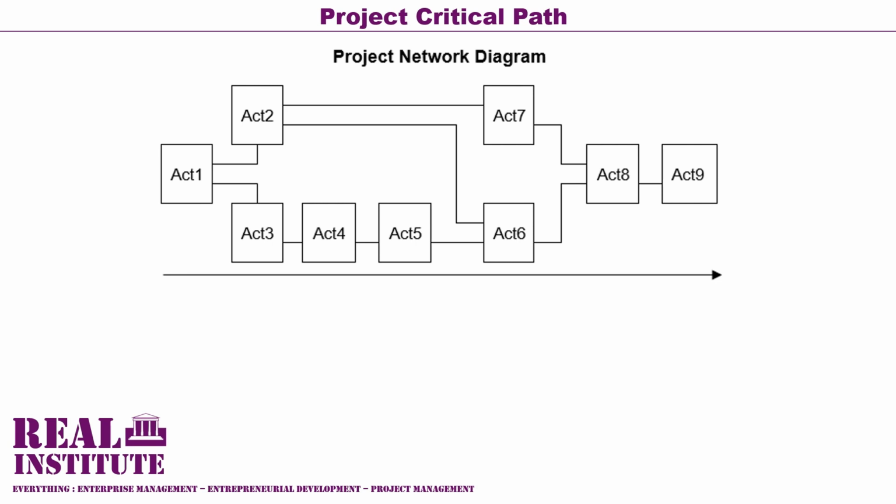Logically and practically, the house walls building activity cannot start and cannot even happen before the activity of building the house foundation has been completed. Such a relationship, such a logical and practical dependency between and among the project activities, is applicable to all types and all sizes of projects.